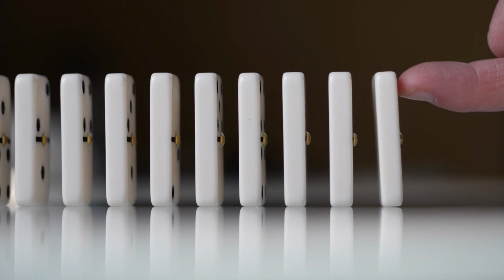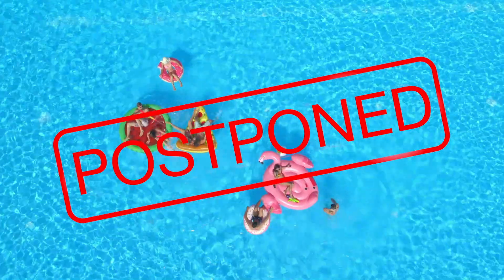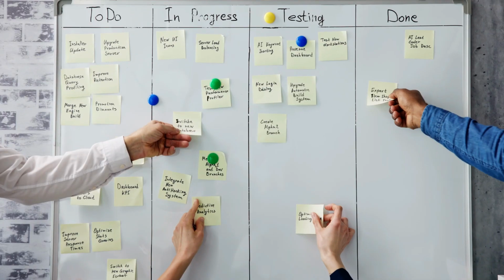One of the things that can come up is scope creep, meaning you had thought that this piece of work would take 25 hours to build, but then you find out that, oops, this is gonna take actually 35 hours. And you still have to make sure that your project timeline is met. Otherwise, you're gonna end up creating a domino effect and mess up with your launch date or postpone your launch date. So you wanna make sure that you're really controlling scope of the work. And of course, it can go in either direction, meaning you realize that this was gonna take 25 hours and it's actually only gonna take 10 hours, which means you have room to incorporate maybe a little bit of more work. So make sure you're wearing a project manager hat in this execution phase.